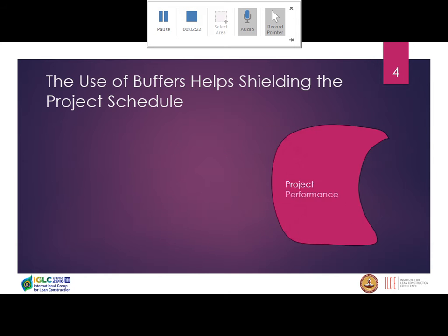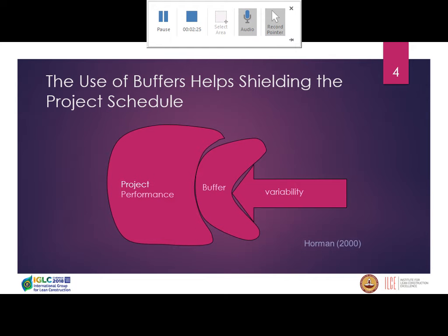As a strategy to stabilize our workflow and reduce inflow variability, we may use buffers in the form of extra capacity, extra inventory, or time added to our schedule to protect the production unit against the variation coming from the environment, as well as to prevent dissemination of variation from the production unit to its environment. Basically, buffers help us to compensate for the variable rate of supply and consumption in each production unit. So they help us to smooth out the production.